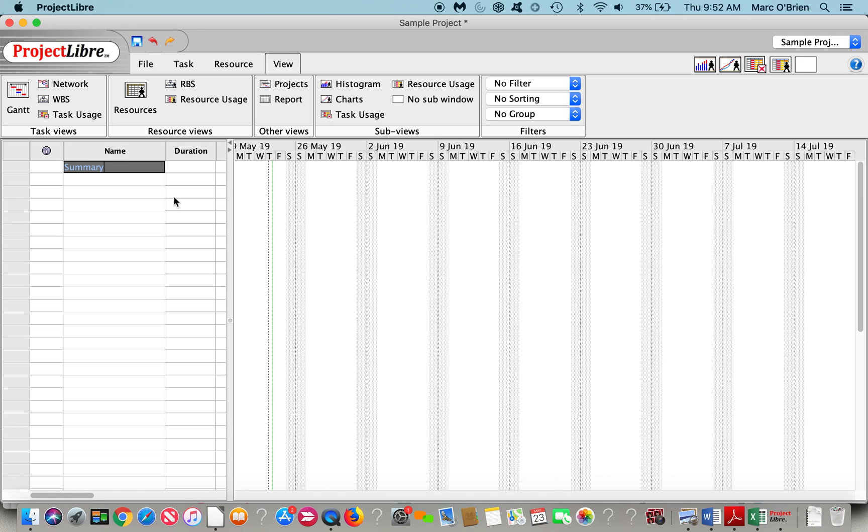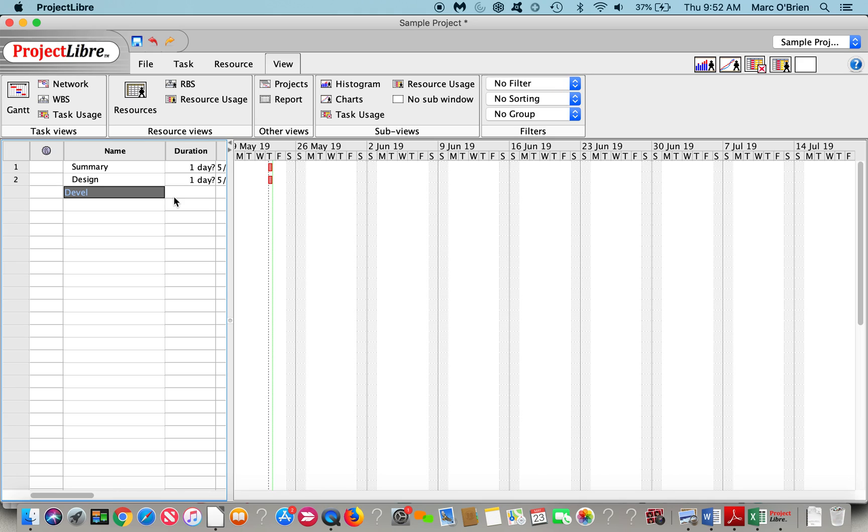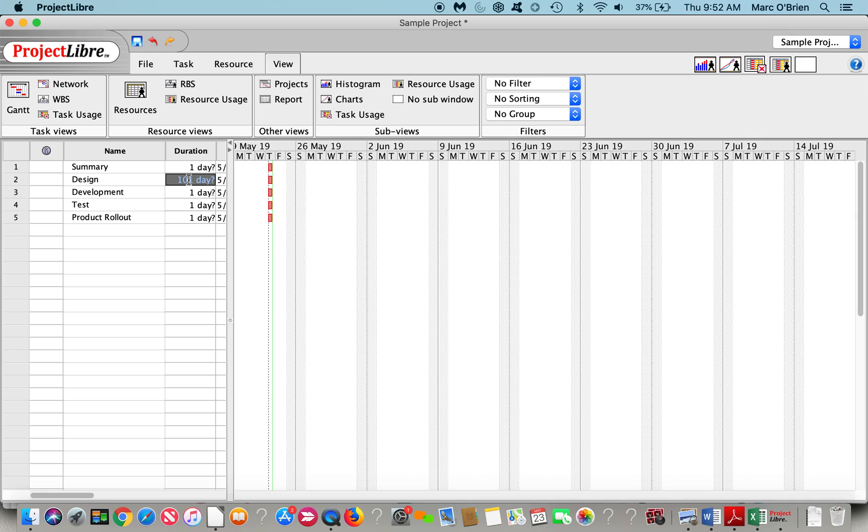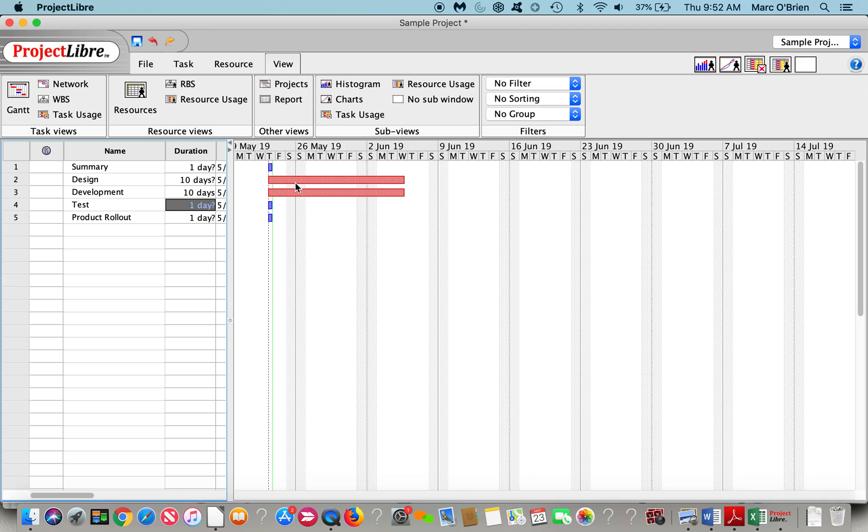I'm going to put some tasks in here. I'll put a summary task, say it's a design task, maybe a development task, test it. And then we'll do a milestone for product rollout. You can see the durations come in with a question mark next to it. That is an estimated or tentative duration. If I actually put a duration in, 10 days, you can see that as the cursor goes down, that question mark goes away. Testing, let's make that five days, and we'll make product rollout a zero day milestone.